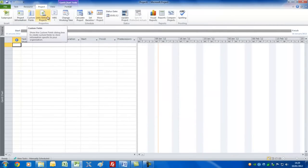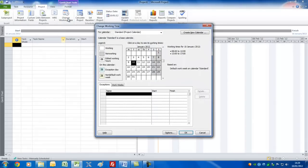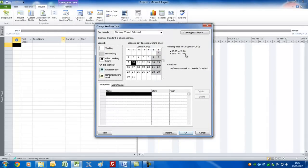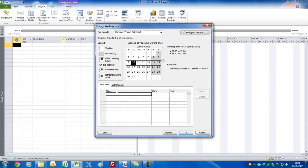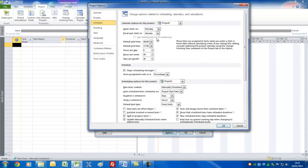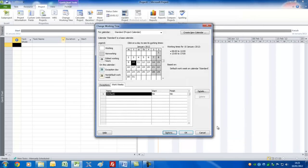The next step is to actually set up your project calendar. For this we stay on the Project menu and go to Change Working Time. For small, simple projects, I don't see any reason why you'd need to change this. Project by default starts at 8 o'clock in the morning, goes through to 12 o'clock — 4 hours work — takes an hour off for lunch, and then does 4 hours in the afternoon, bringing you to 1700 or 5 o'clock. Doesn't work Saturdays and Sundays. If you wish to change anything, under Exceptions you can put in particular dates — for example when your company might be closing down. Or go to Work Weeks and here you can change the hours that you work per day. If you do change the hours, go back to Options again where you can make this harmonise with whichever you've got, because it changes the way in which Project calculates. For now, I'm going to suggest everything stays exactly the same.